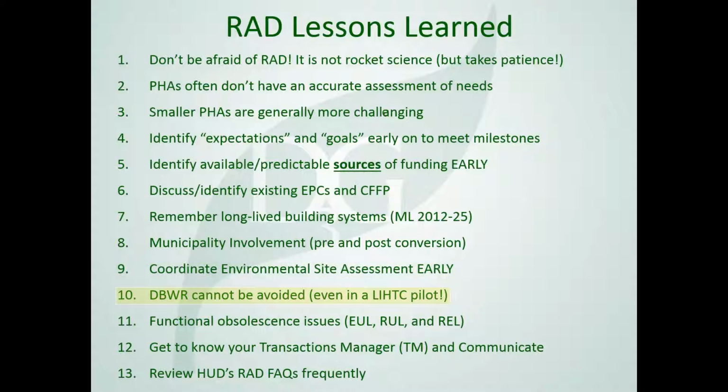Number 10, Davis-Bacon wage rates cannot be avoided within RAD, even in the LIHTC pilot. I hinted at this before. I want to say it again. We must pay Davis-Bacon wage rates with all repairs within a RAD project. That's statutorily required.